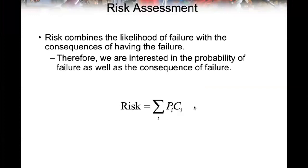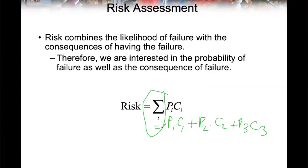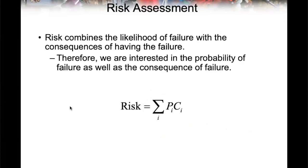How do we aggregate the risks? We do probability times consequences and add them up: P1×C1 + P2×C2 + P3×C3, and so on. Then you have the aggregate overall risk. That's the first equation in risk management that we need to know — probability times impact. We look at probability and consequences, multiply them, and then prioritize them. If the system has multiple parts, calculate risk for each part and add them up.